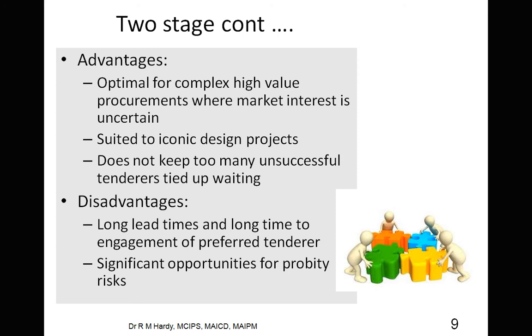So what it means is that because you're only talking to a smaller list, a short list of tenderers, then you're not tying up the time of tenderers in spending the resources to actually go through the tender process. Get people to give you their expression of interest, and then for those who are not that interested or not that qualified, you can cut them loose and they can move on with their lives.